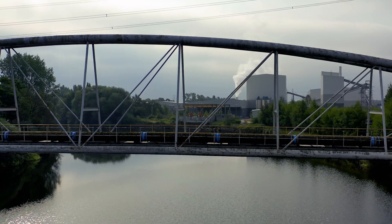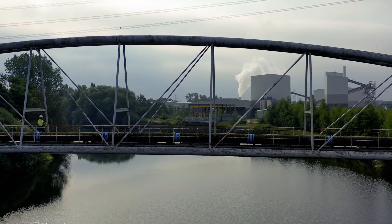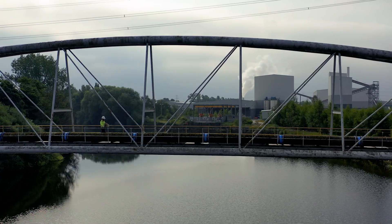When we look at the weight of the bridge and the reach that the crane has to go, to get a 90-ton lift we required a crane of the size we had because it was reaching at a significant distance.